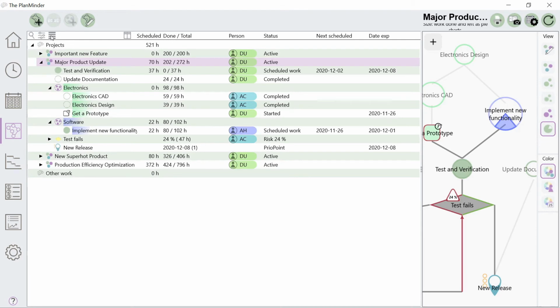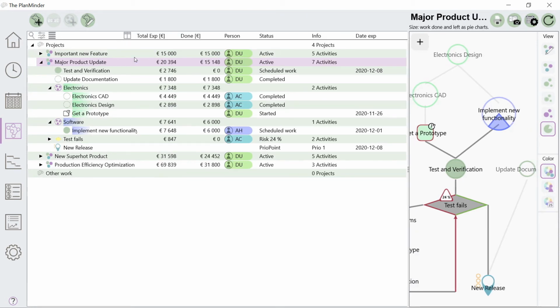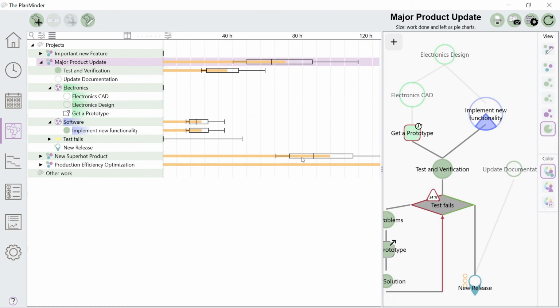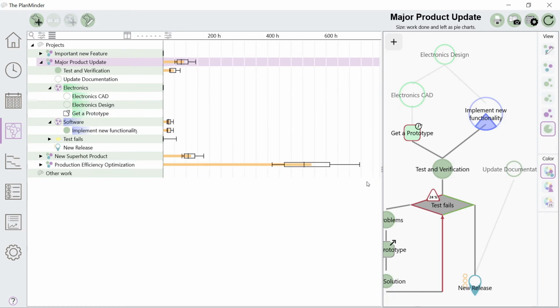All time for the project, schedulable or not, is included with uncertainties. If you have set up different costs for team members, you can view this information as costs instead of hours. The Kairos view is also a good place to find where the biggest uncertainties and risks come from. If the uncertainty is too big, it may be a good idea to set aside time to do more investigation before you make major commitments.